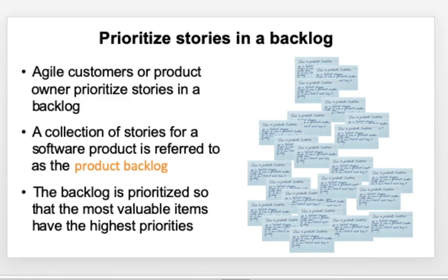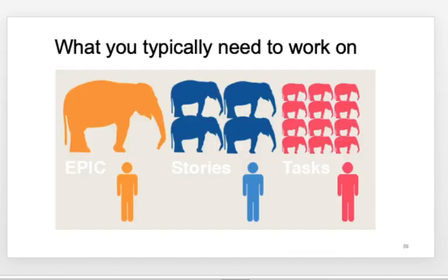So I am probably trying to transfer a few items from the bigger bucket into a smaller bucket, and the smaller bucket is termed as the sprint backlog. Which items to move from the product backlog to the sprint backlog will be basically decided on what is called prioritization. Means higher priority items will be moved first from the product backlog into the sprint backlog.